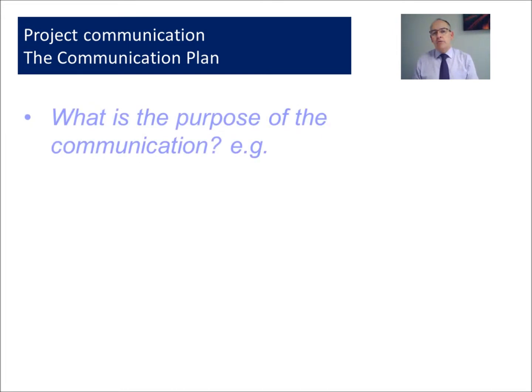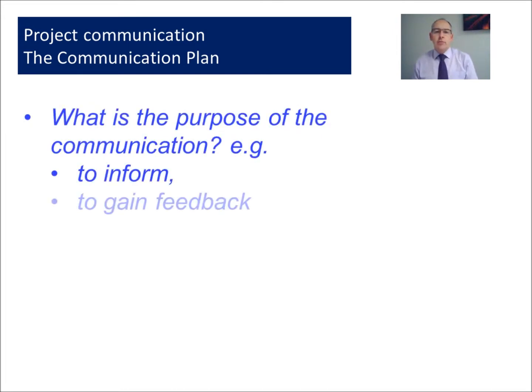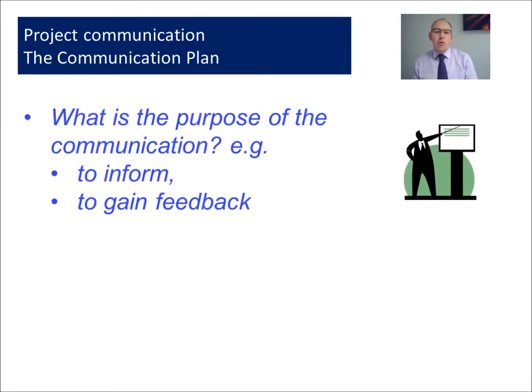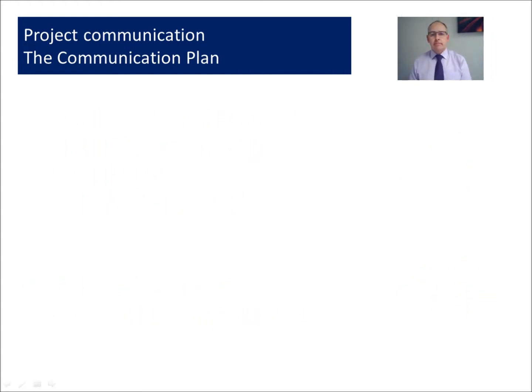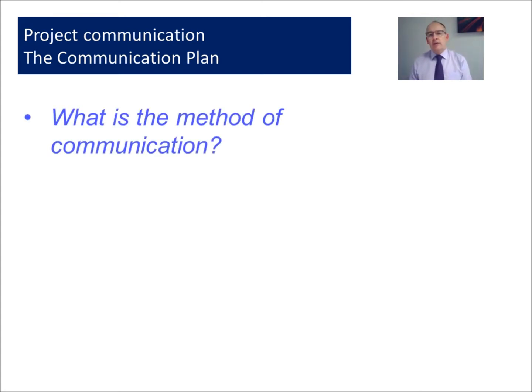We've identified the different stakeholder groups. Now in our plan we should look at what is the purpose of the communication. Is it to inform, to gain feedback? And how often are we going to communicate with those stakeholder groups? Daily, weekly or monthly? Next we need to look at the method of communication.